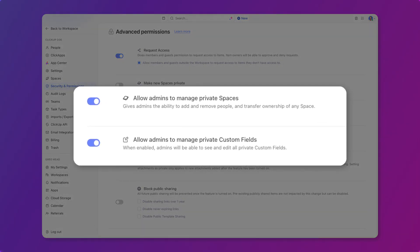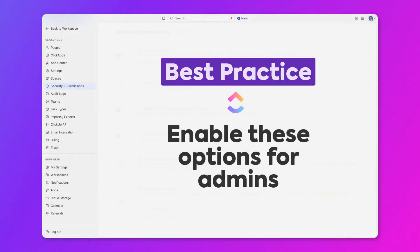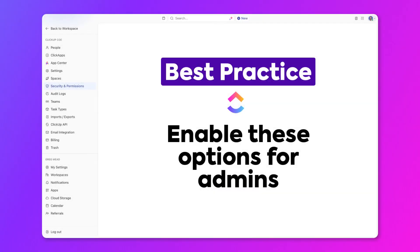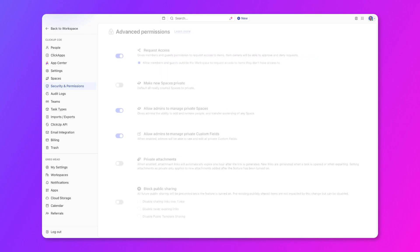Allowing admins to manage private spaces and custom fields. Allowing admins to manage private spaces ensures that you're able to access all spaces and transfer ownership of them if people ever leave your company. Same thing goes with private custom fields. This way, if someone leaves your company and is deactivated, you can still access the space or the custom field and transfer ownership of it as needed. So as a best practice, be sure to enable these two options to allow admins to manage private spaces and custom fields, so admins will be able to manage their workspace data effectively.